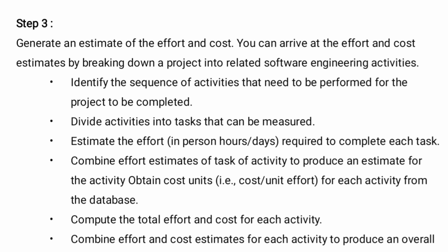Step 3. Generate an estimate of the effort and cost. You can arrive at effort and cost estimates by breaking down a project into related software engineering activities. That is, break down the project into smaller modules. That is, identify the sequence of activities that need to be performed for the project to be completed. Divide the activities into tasks that can be measured. Estimate the effort required to complete each task.